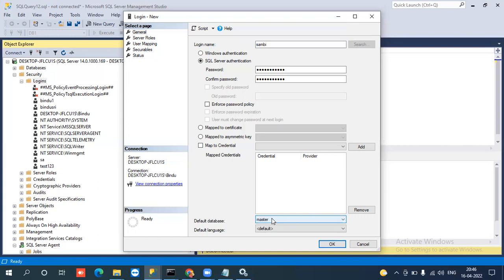Evidence confirmation means it should be either a mail or a change request. There will be a change request or incident, one ticket will be raised. You should have either the ticket number or the mail confirmation. The chat will be automatically gone after you sign off. If you log in tomorrow, your chat is not available. But after 10 days, if an escalation comes, how can you prove it?